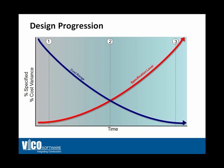I did show this diagram last week, reflecting the design progression of the project. To the left side of the diagram is the start of the project, when the specification level is really low — you only know the requirements as defined by the owner, such as the number of square footage of office space required and the number of parking spaces. At that point in time, the cost range you need to work with is large; the variance between minimum and maximum cost is pretty large.